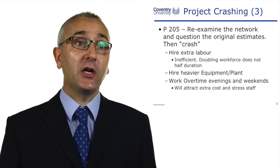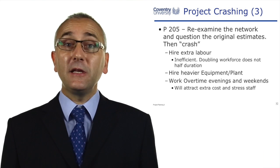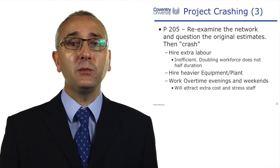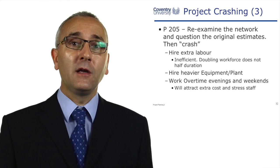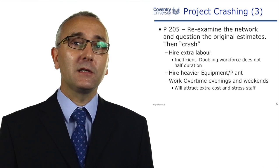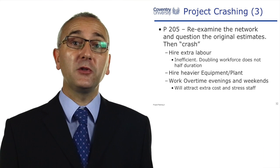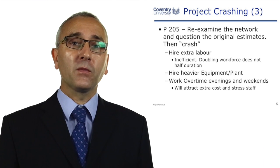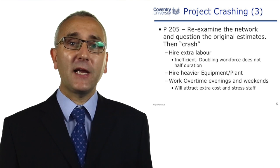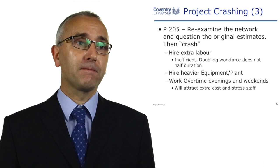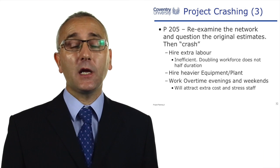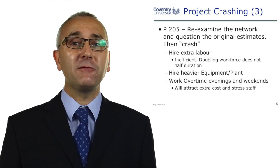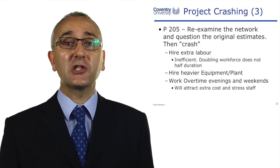Lock suggests hiring extra labour, but points out that it can be inefficient and that doubling the workforce does not mean we halve the duration. In the painting example: we've got 20 hours of work. Put two people on the task — duration might come down. Put a third person on and duration may reduce again. Put a fourth person on and maybe we don't have enough paintbrushes or ladders, so the duration will not reduce. Hiring specialist equipment — Lock is agreeing with Gardner's view there. Working overtime costs money and can stress the staff.